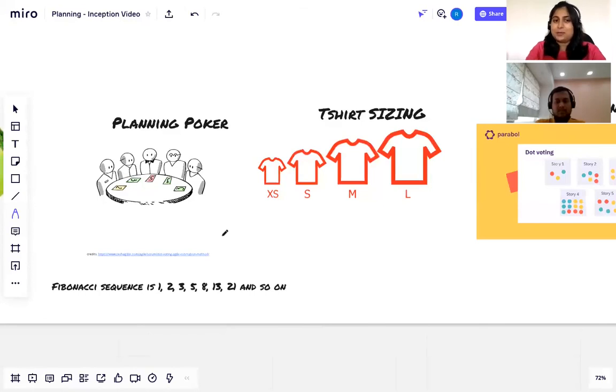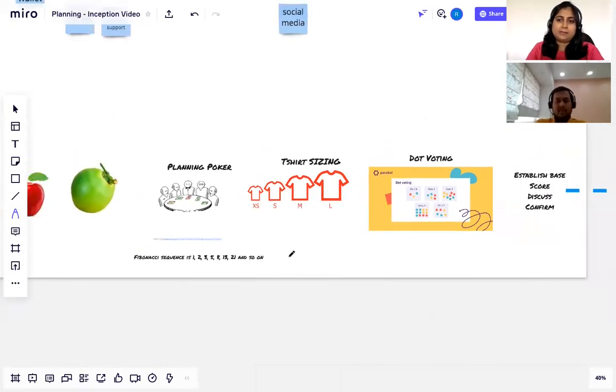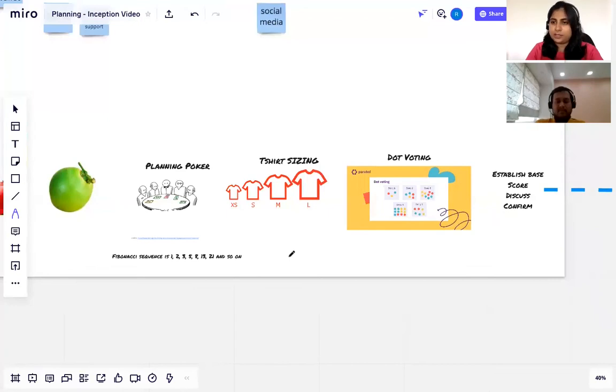What is important is you ensure discussions happen and you hear someone else's perspective as well, and you build a holistic opinion about things. And you repeat it till you get consistency, or you go up to round 2 and round 3, and then you have some rules set for yourselves that, even after round 3, you'll go with the one that is highest. Again, my suggestion is not spending a lot of time doing it. Be quick, do what comes to you. It's better to fail in your plans rather than to plan so exhaustively that you don't start implementing or working on anything.